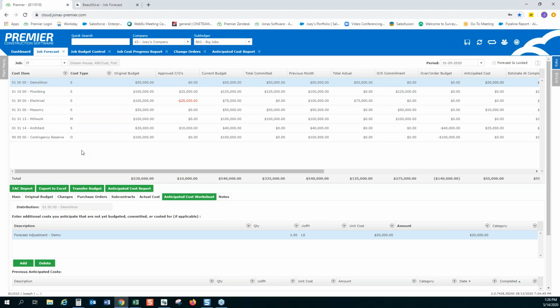And so the purpose is to hedge the risk against your margins, so that you'll know, okay, I projected this much margin on my job with a buffer of, in my example here, $100,000 more or less. Whether or not you use all of that up is up to you, but it shows you've planned for the potential risk of other items coming in.